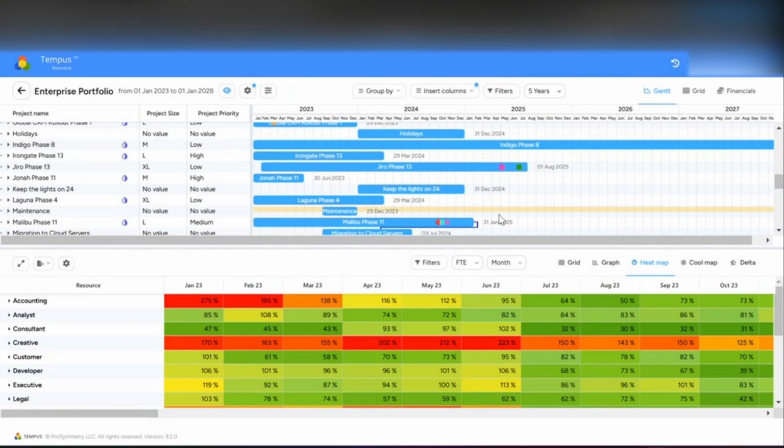Now, let's walk through how to use the model when it comes to your projects specifically. So first and foremost, within your model, you can determine the ideal project start and end dates based on your resource availability. You can also change the duration of the projects as they exist in here. You can include and exclude projects. So maybe you're bringing a new project in, but you're excluding a few lower priority projects. You can also utilize the opportunity map that tells you roughly when the project should start based on your resource availability. And it'll show you your best options there, or your options in general.